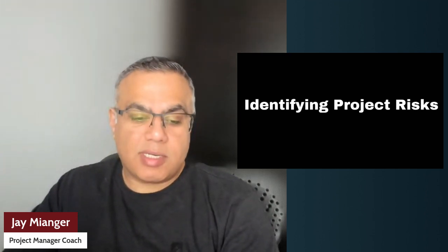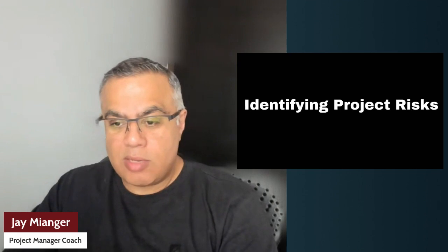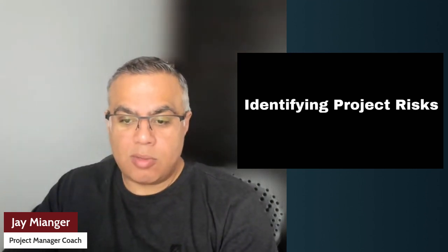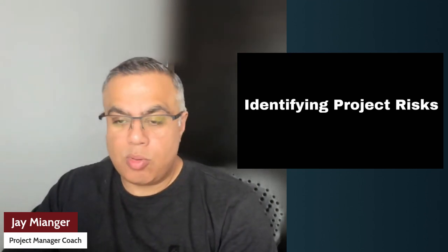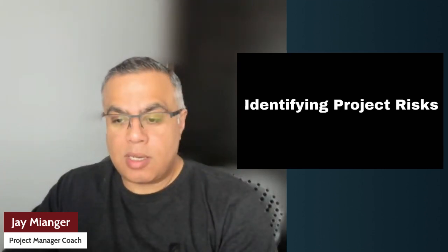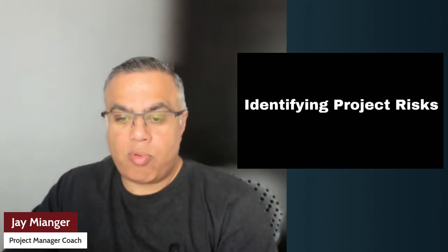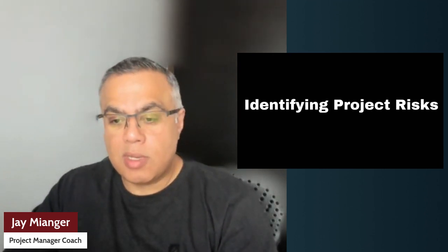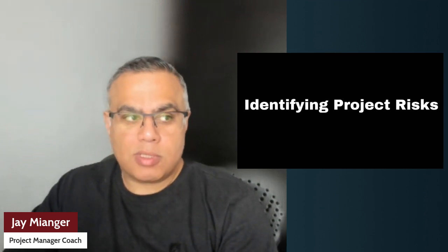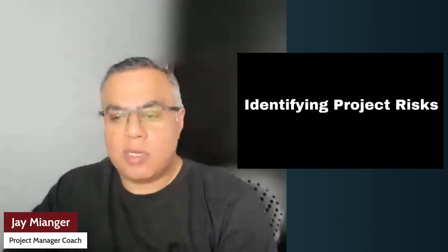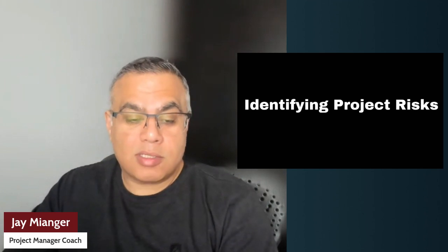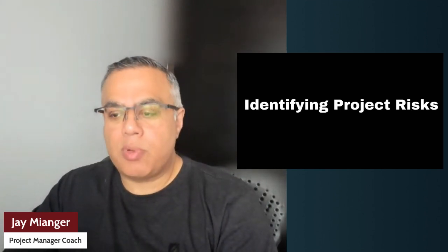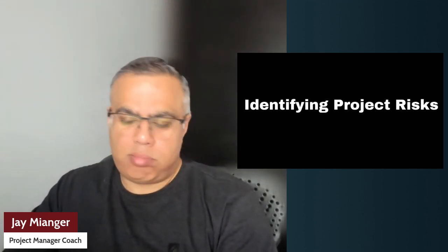Now, methods of identifying project risk are part of your planning stage. You start looking at what activities, who's doing what, and what techniques. You start brainstorming. Have sessions with your team where you sit and brainstorm risks they foresee. Because whatever project you do, there are certain risks that you can foresee. For example, annual leave, people's holiday.